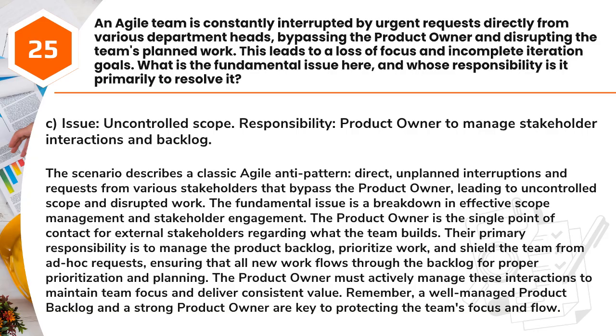The product owner is the single point of contact for external stakeholders regarding what the team builds. Their primary responsibility is to manage the product backlog, prioritize work, and shield the team from ad hoc requests, ensuring that all new work flows through the backlog for proper prioritization and planning. The product owner must actively manage these interactions to maintain team focus and deliver consistent value. Remember, a well-managed product backlog and a strong product owner are key to protecting the team's focus and flow.